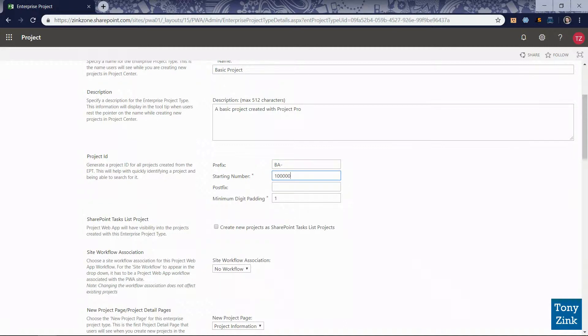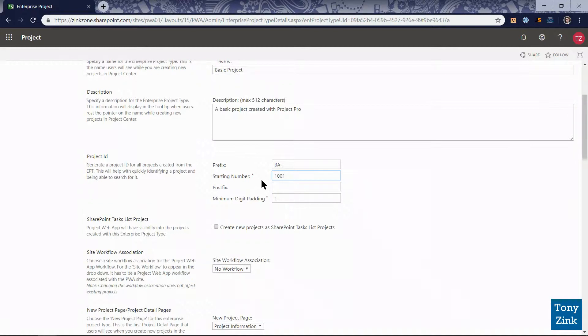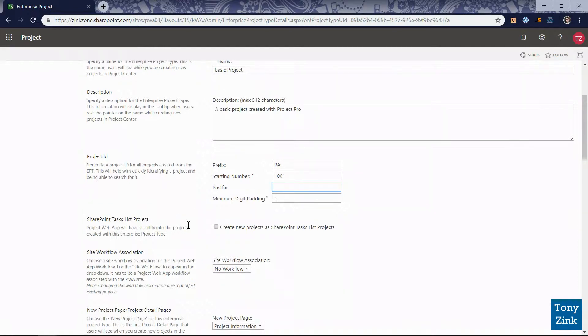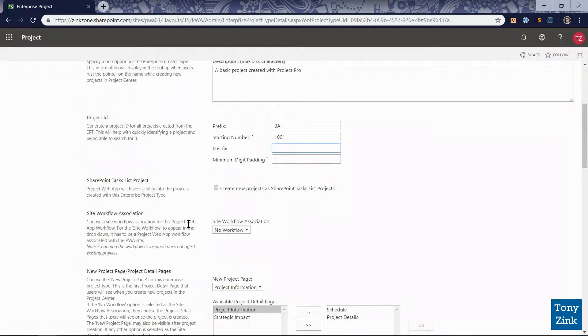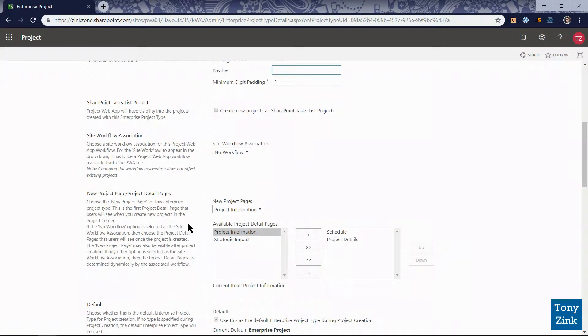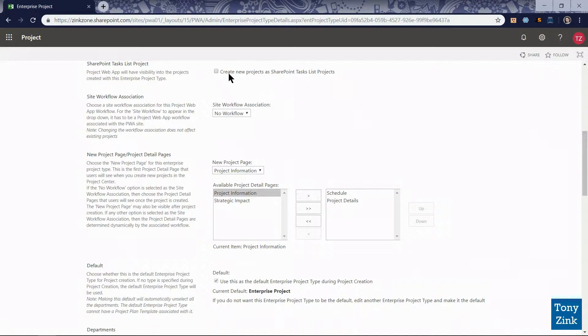Secondly we have a starting number here so I don't think that we're going to have hundreds of thousands of any type of project in the system much less basic projects so I'm going to take that down to 1001. So every basic project that's created in the system will have a numbering scheme that looks something like this BA dash 1001. We have the opportunity to put a suffix or postfix on the end and I'm going to leave that alone and keep going on down the page here.